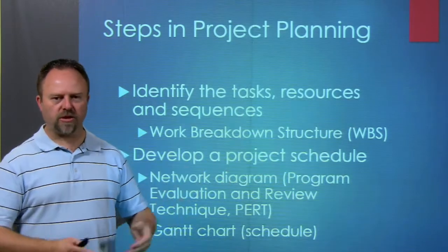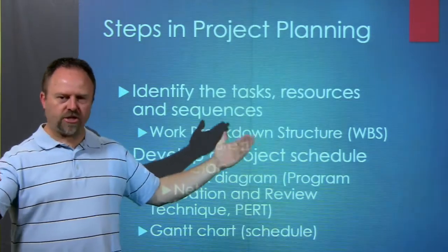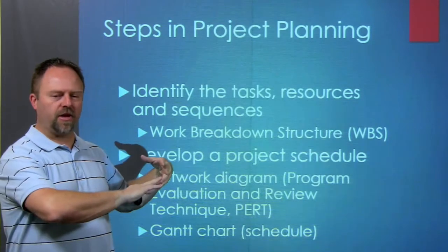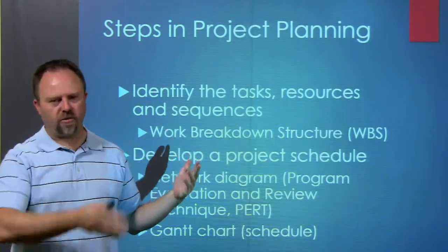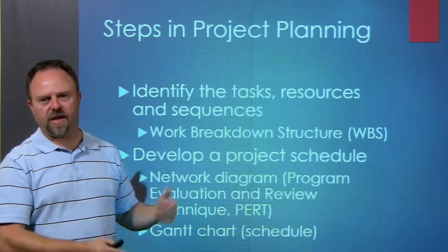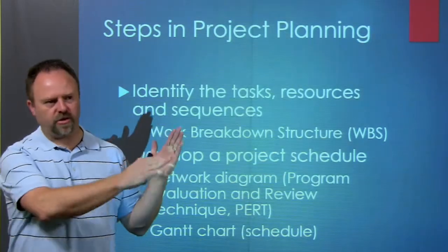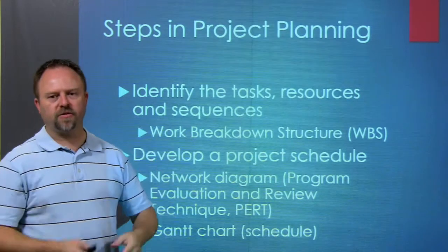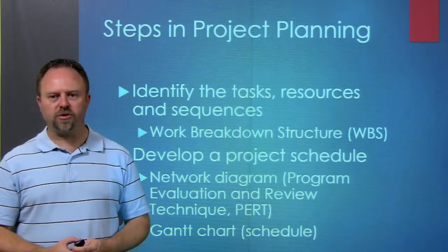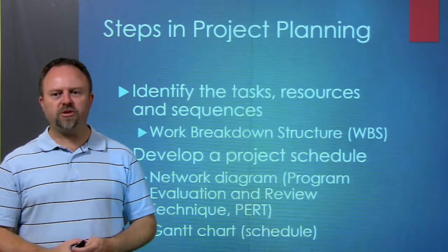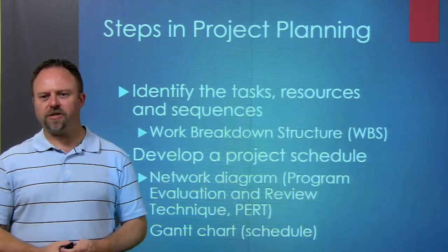I remember when I worked at a company, we had a big, huge Gantt chart for our project, and as the equipment was being built, they were marking off what's done, what's not done, and you had a date, say this is today, and you can see, are you on task for everything that's supposed to be done by today. So the Gantt chart is a pretty useful tool too. So we'll go on to look at some of these tools and how we can use them in project management.